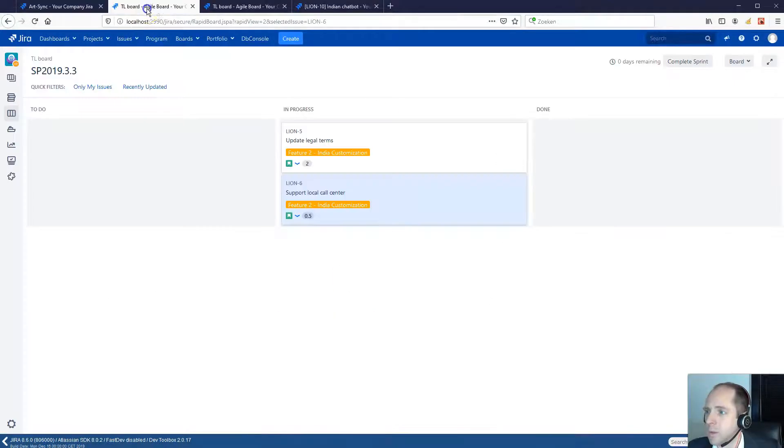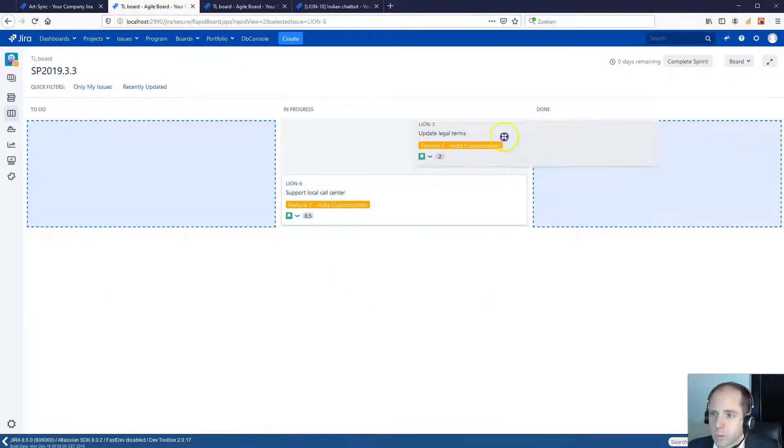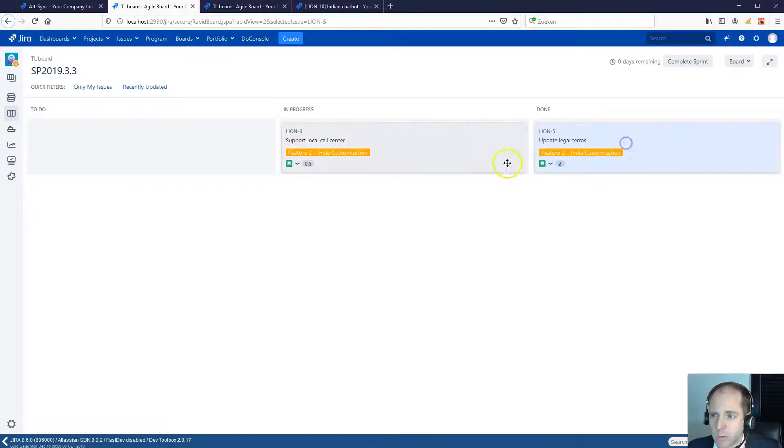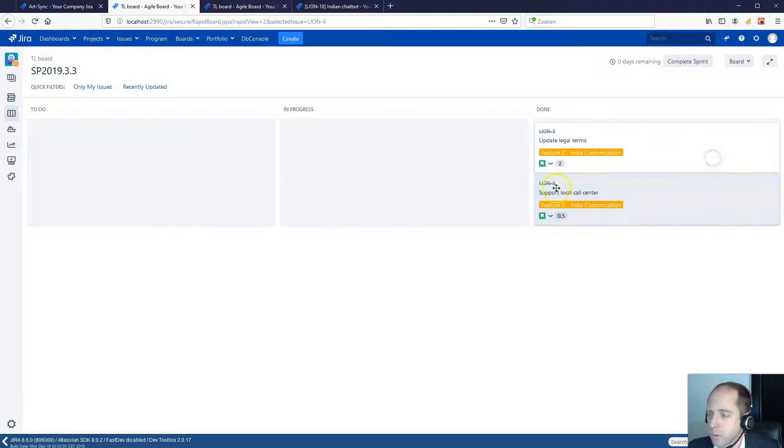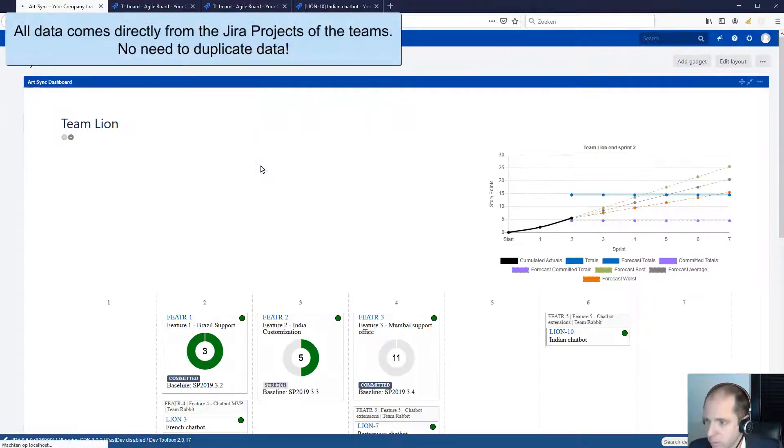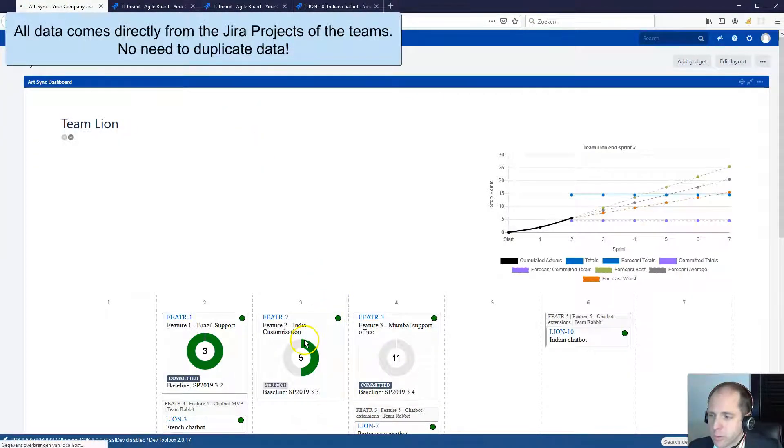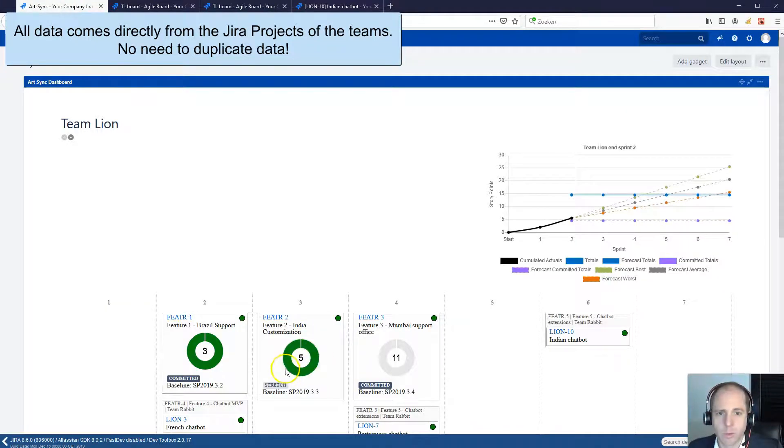Suppose that a team finishes their work for a specific feature and moves their stories to done. In that case, the indicator for the feature also moves from halfway done to completely finished.